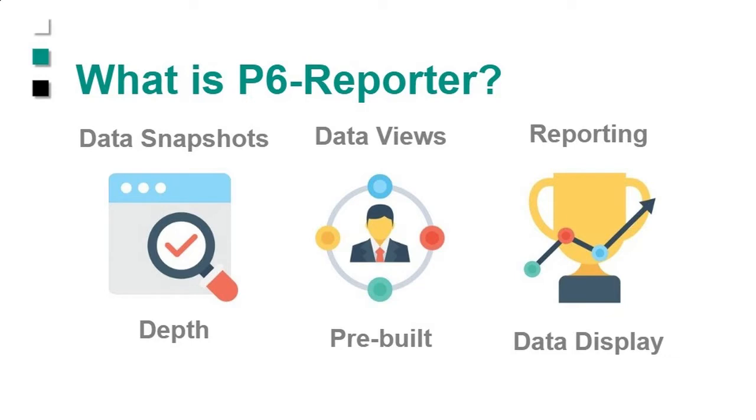I'm going to ask one quick question and then we're going to jump into the showing. How often do you do reporting? What are your requirements? It's going to depend on your projects, of course. If you're doing turnarounds, you're going to have daily, I would think. If you're doing capital, you're looking more like weekly, every 2 weeks, maybe every month. It's going to vary depending on your projects, and weekly updating can be challenging in a capital project.